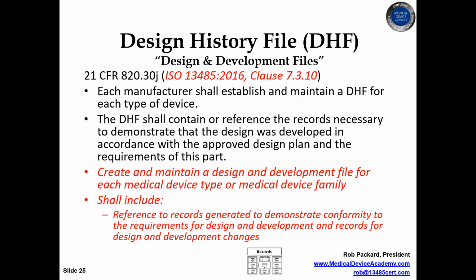One of the things that probably should not be so prominently displayed in the DHF is every single meeting minutes. So if you're really organized, you'll have meeting minutes for every single meeting you have over the last 18 months or so. Typically that's put in an appendix at the end. I wouldn't put that in each of the phases of your document. Instead, I would put that in an appendix at the end, and I would just have the documentation that you approved for the design reviews in each of the 5 tabs for each of the 5 phases. And I would put those detailed meeting minutes at the end as an appendix. They're still part of the DHF, but it's not the priority for a reviewer, so bury it at the back. Not to hide it, just to make it easier for the reviewer to get through your DHF in a timely manner.